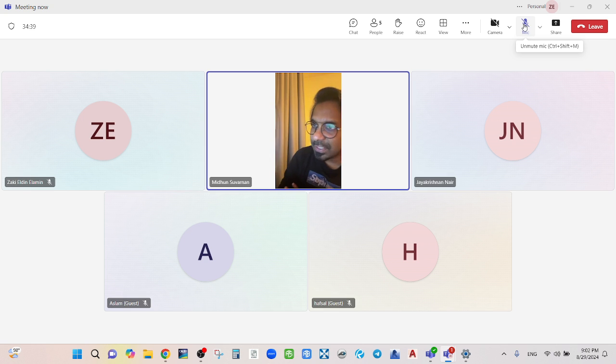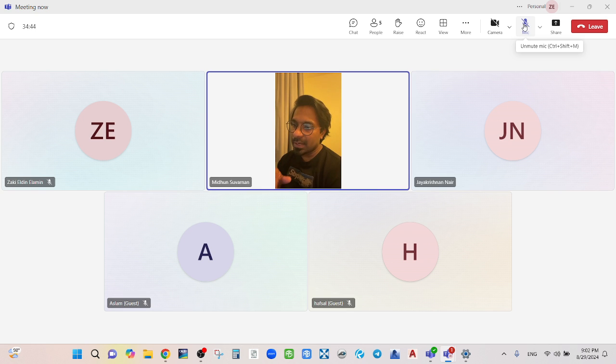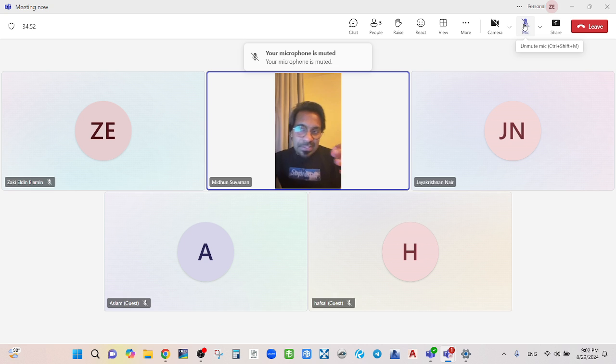You know why it is 10 percentage? Anybody know? Any idea? Normally it's 10 percentage. Why? Because, first, obviously, it's a standard practice in the industry. It's a customary practice, a de facto standard, because if you go to court also, 10% is common practice. The court will see, okay, it's not an unreasonable amount, it's a reasonable amount. 10% is the amount which all the contractors are submitting. So this is fine. That is the first case.